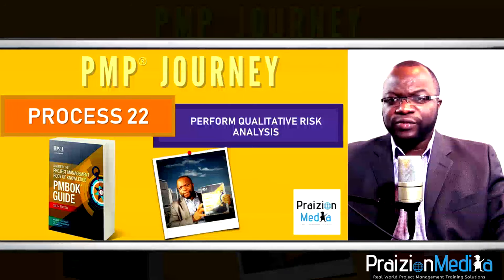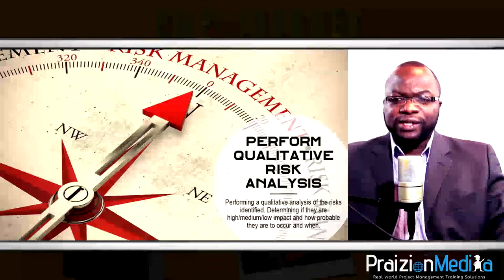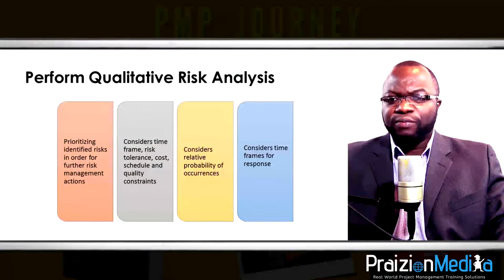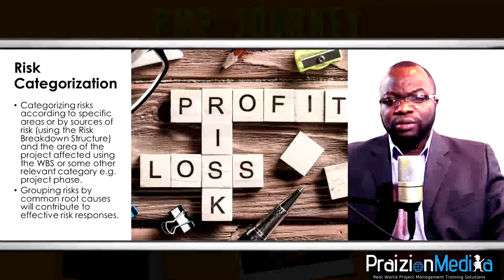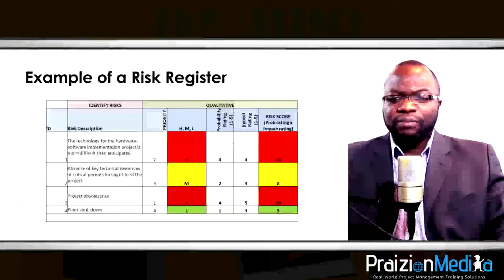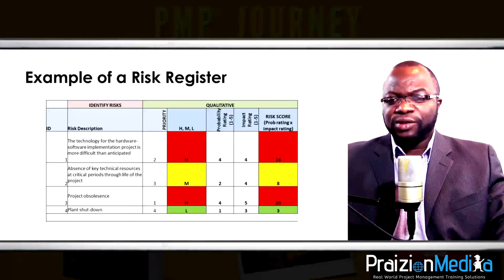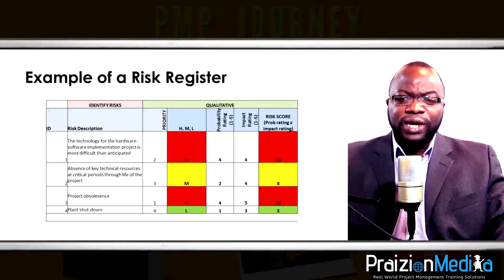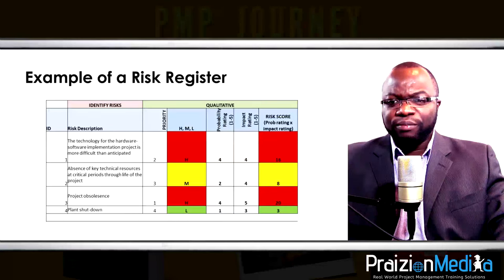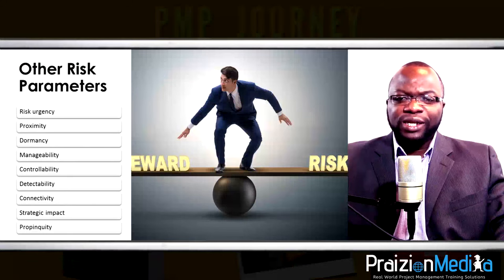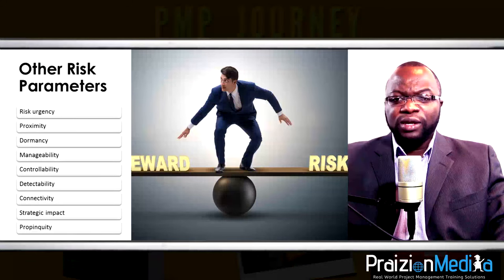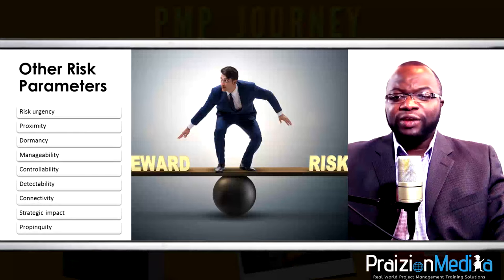Process 22: Perform qualitative risk analysis. Your main aim is to rank risks from top to bottom. You could rank them by probability, by impact, or hybridize by multiplying: on a scale of 1 to 5, probability 3 times impact 4 equals a risk score of 12. You also think about risk urgency assessment — what do we really need to take care of today — as well as risk propinquity and risk proximity.